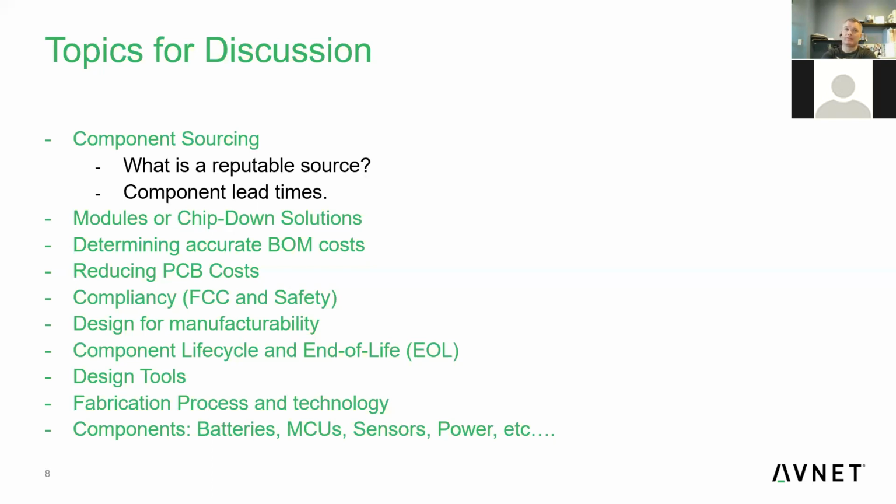We're seeing, in some cases, lead times go out beyond a year on some of these ceramic capacitors. At first, people didn't get too concerned, because you're still talking about relatively lower volumes, and there still seems to be lots if you just switch the part number.